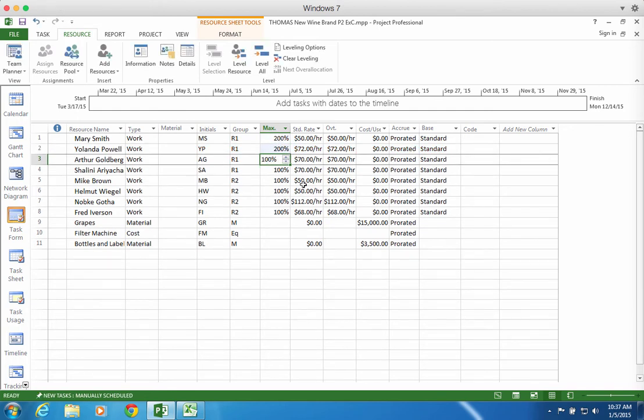So at this point, what I've learned is that in 2 specific weeks, maybe I can find temporary help from other people in the firm. Maybe I can hire in some outside labor. I'm seeing some sourcing issues that I'm going to have to deal with as the resource manager.